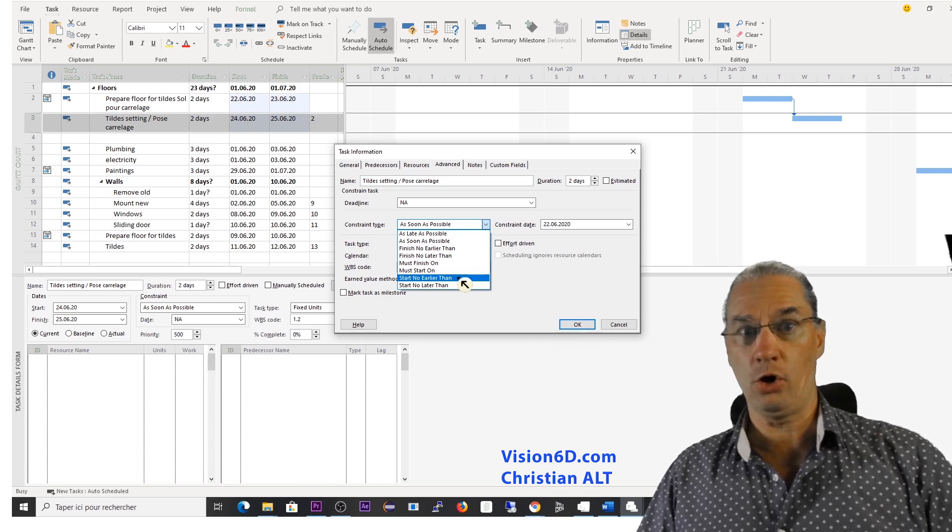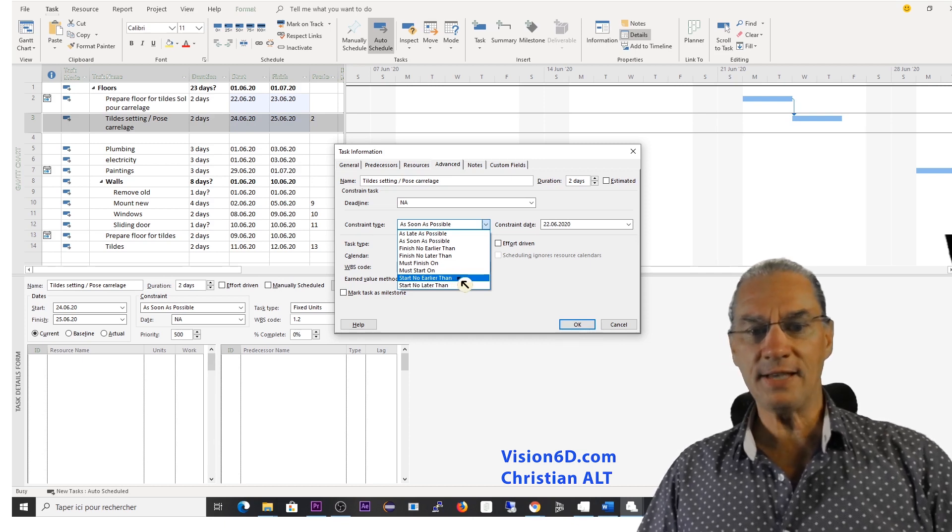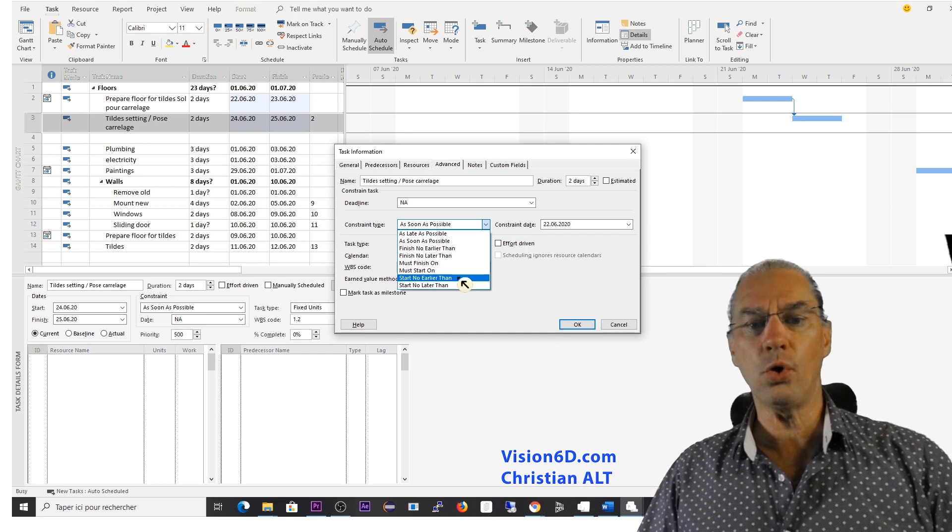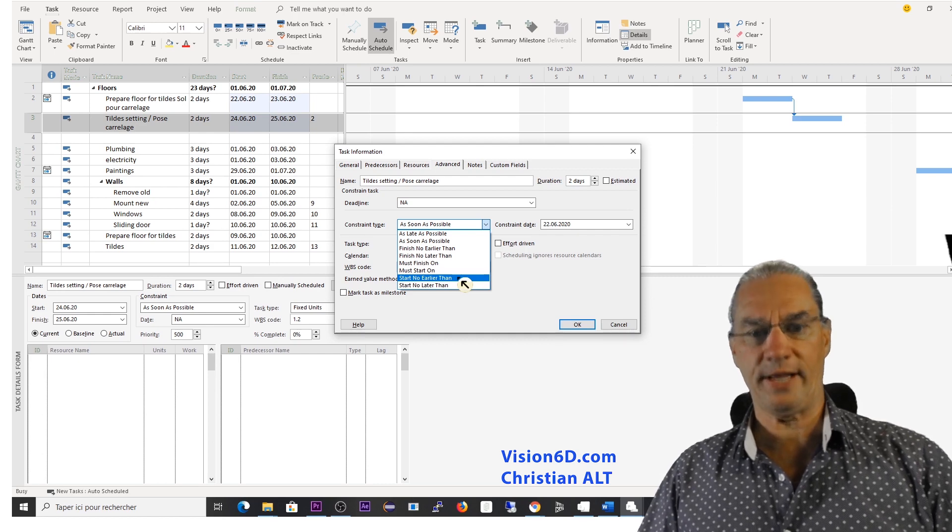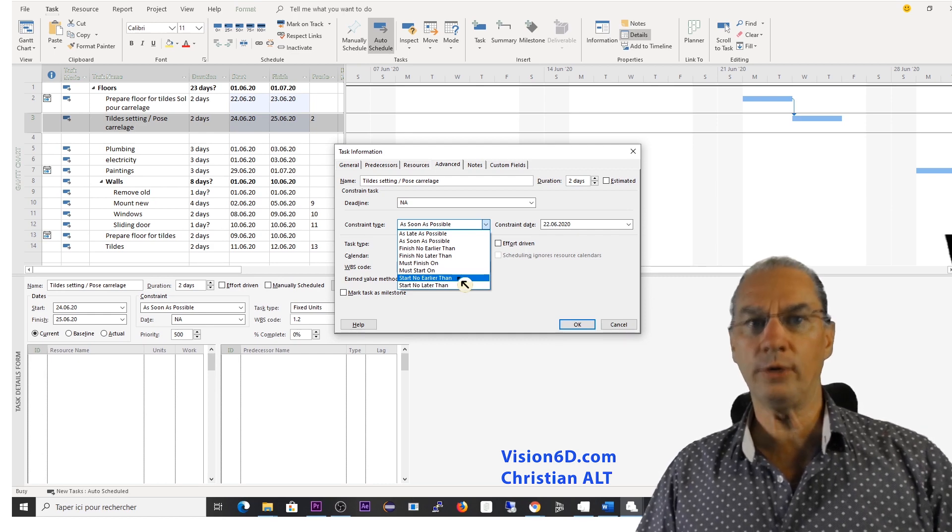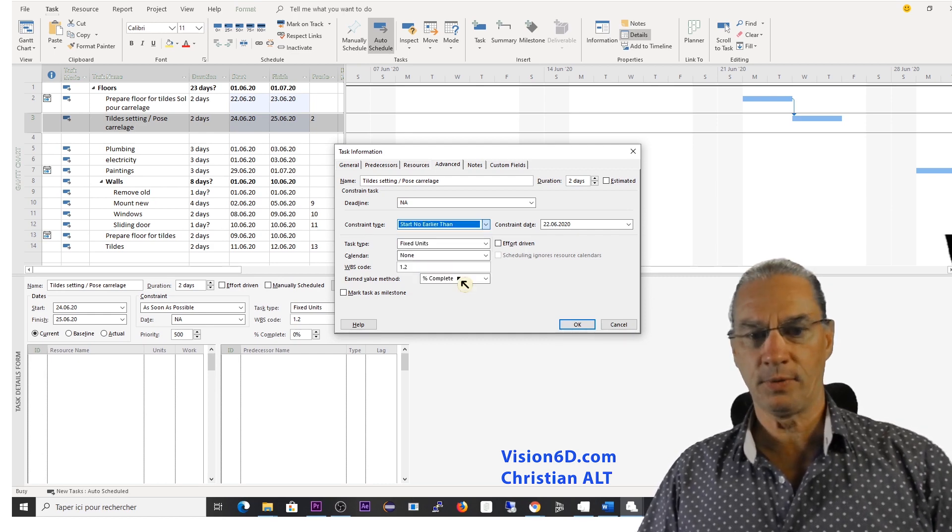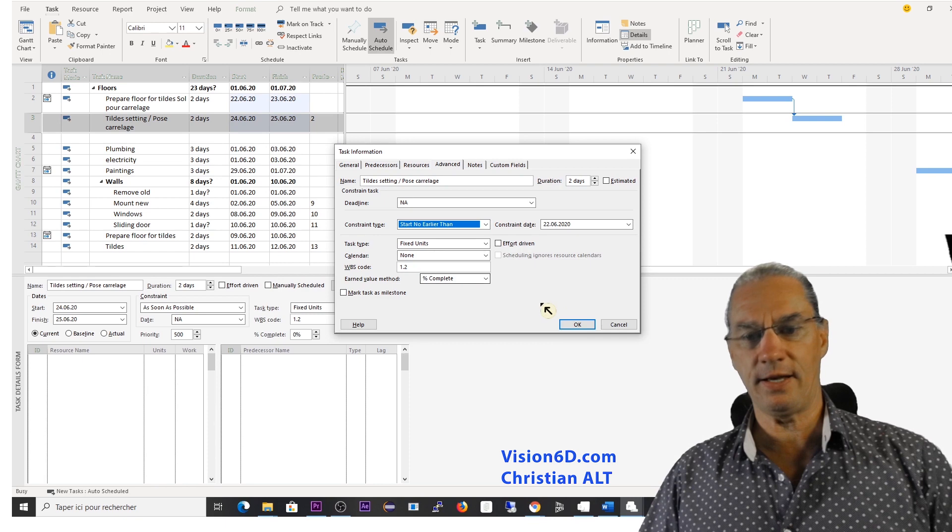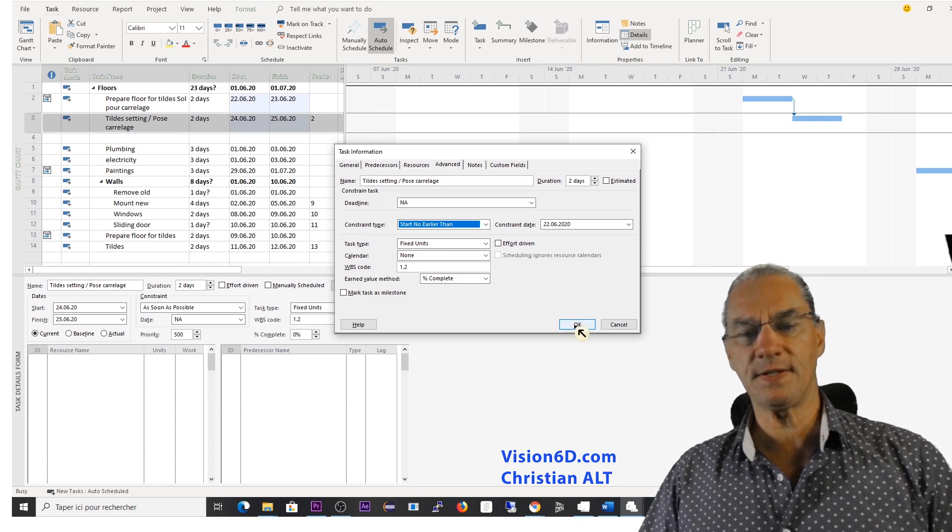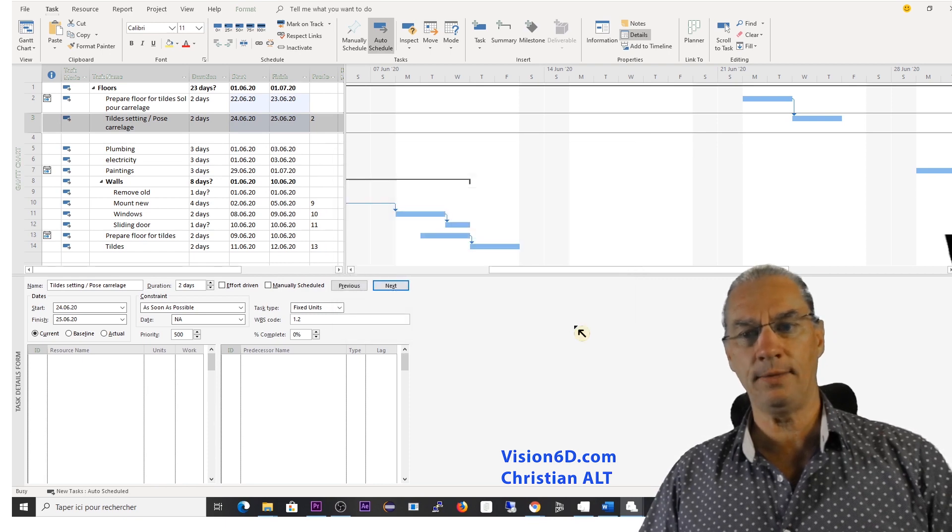And you see that we have different kinds of constraints. And the one that interests me and that will solve my case is start no earlier than when we get the tiles. So I set this and I say here OK.